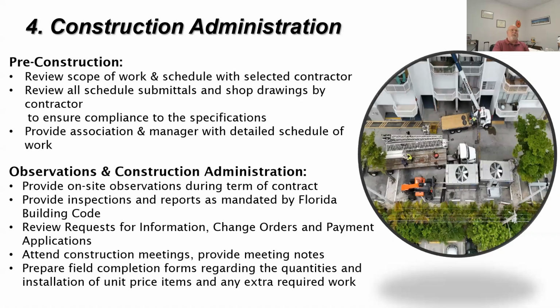You don't necessarily want to put it on the roof because of the expense and the time that it takes. On the other hand, I had a property where there simply was nowhere on the ground to do it, and we were able to figure out that the stair tower roof above the stairs will actually support the temporary towers. And so we were able to put the temporary towers up on top of the stairs, up on the roof. So yeah, but again, that's part of the planning process. And when you get with that selected contractor, you make sure that that detailed schedule is going to happen.